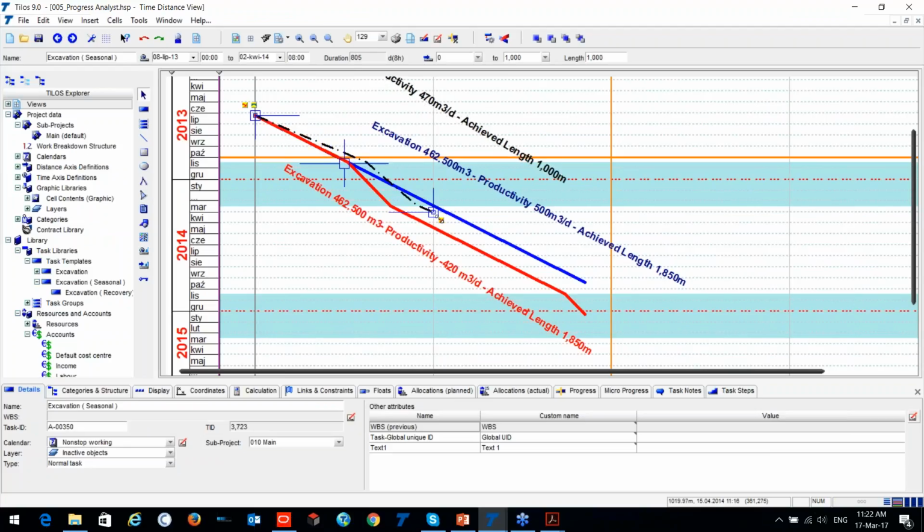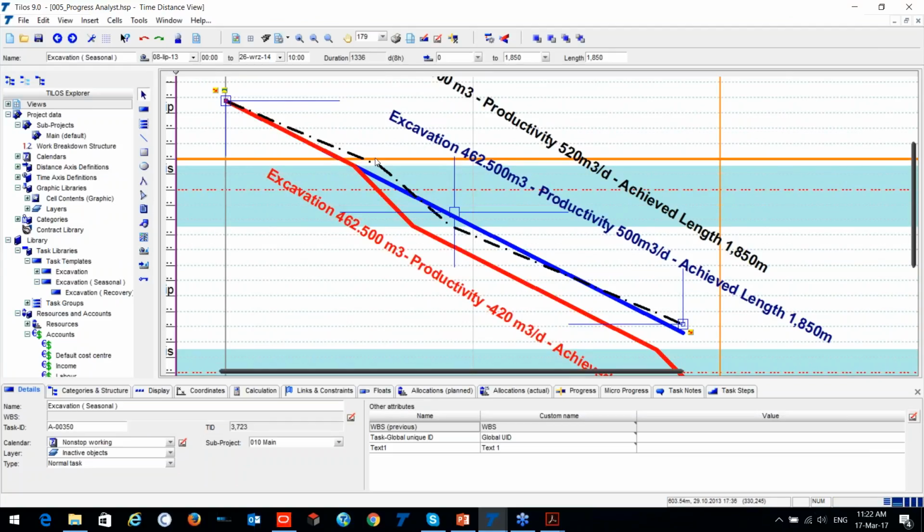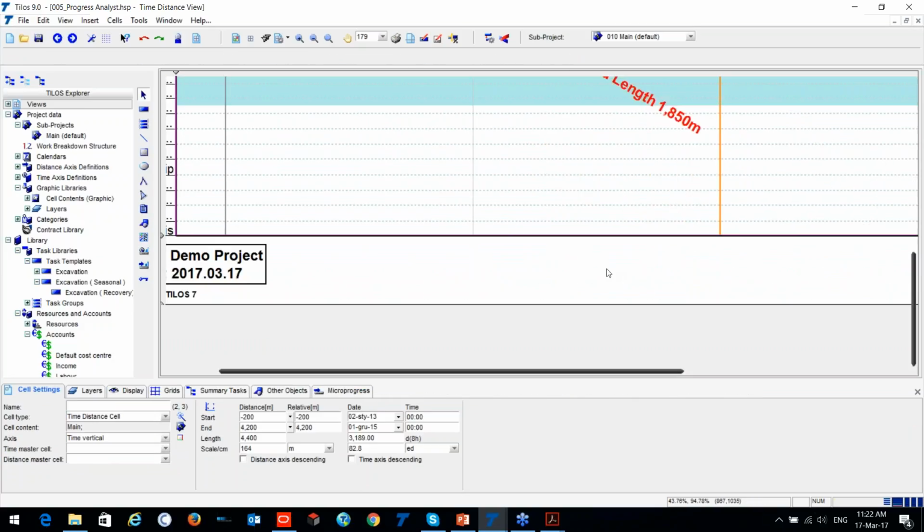So if I have it here, by this time I can catch or even finish my activity much faster. So in this case, your recovery line reached a different distance because of the higher work rate, and you drop down during the winter time, your work rate drops down, and then you are catching, even finishing your baseline. All right, so let me continue with the question.